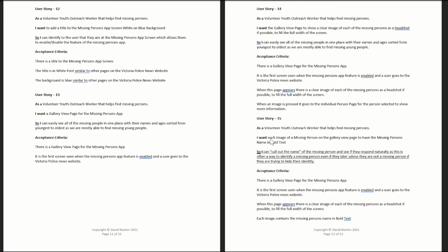As a, and the as a is who is the person that has asked for this, because it may not just be me. You might have, for the same feature or same item, a different person. For example, a police officer might have a different need or want, and that can be added as a user story. So you can have multiple user stories for the same feature. But obviously I'm doing this all for myself, so I've gone as a volunteer youth outreach worker that helps find missing persons. So that identifies who's asked for it.